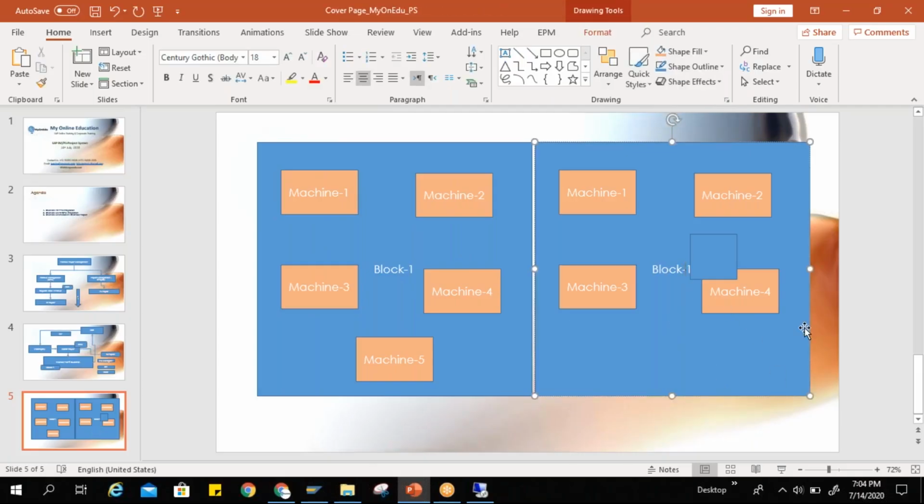Now you need to do the maintenance. So what you can do is create two WBS elements, block 1 and block 2, and within that you can create a network which has 5 activities in block 1 and 4 activities in block 2, and then whatever maintenance orders you are having, you can assign to the activities. So when you are preparing the plan in PS itself, it can be transferred to the maintenance order.